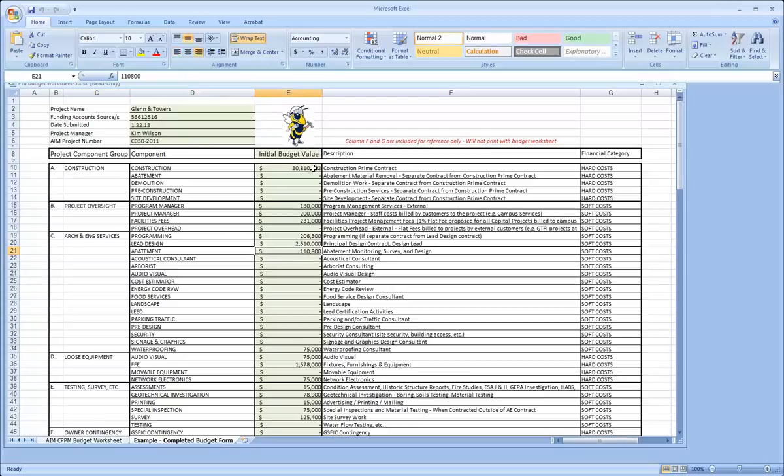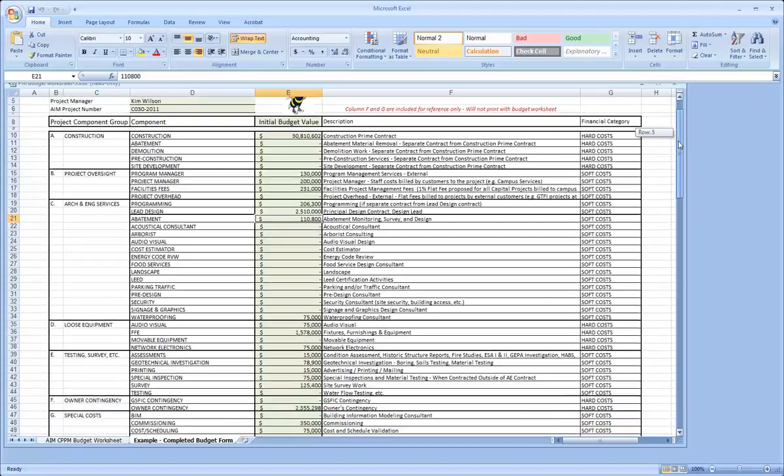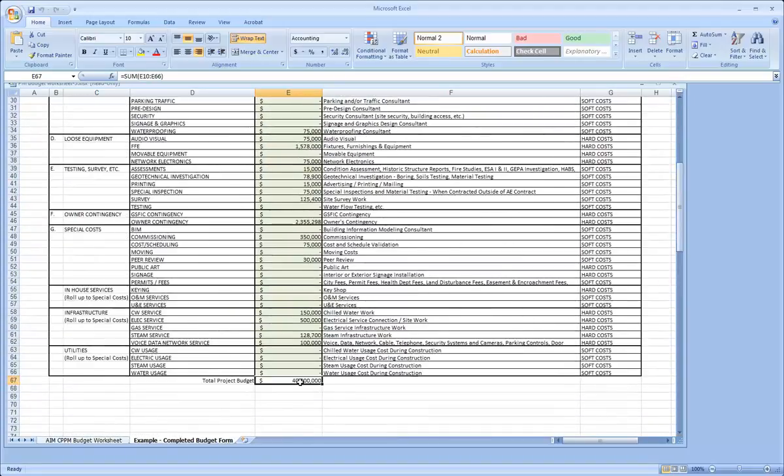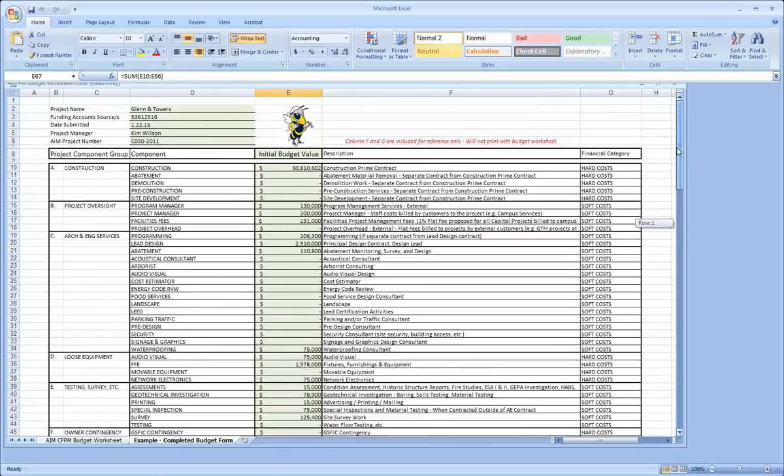$110,800. The project manager will fill this budget worksheet out, leaving blank cost categories where there's not anticipated to be a budget, and the budget sums at the bottom to the total project budget. This form is submitted to the AiM accounting manager and entered into AiM CPPM. The AiM accounting manager will assign these budget values to these cost codes for your future use.